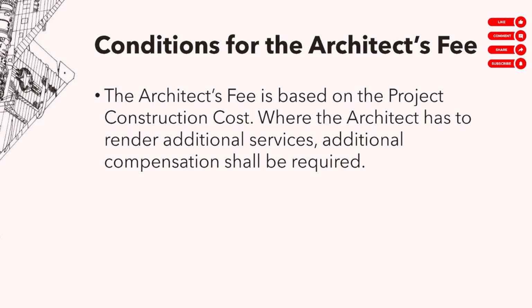Other conditions: the architect's fee is based on the project construction cost. There are many methods of compensation, but the one recommended is yung poporsyento ka sa PCC. Any additional services require additional compensation.